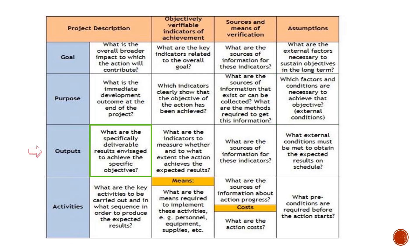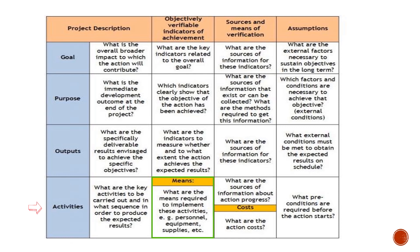For outputs, write the immediate results. In the project description, what are the simple indicators — the possible indicators to measure whether and to what extent the action achieves the expected results? What are the sources of information for these indicators? What are the external conditions and risk factors? For activities, list them bullet-wise. Include required means such as cost, time limitations, and sources of verification. At the end of activities, write what are the preconditions required before the action starts and what conditions are available to start those activities.